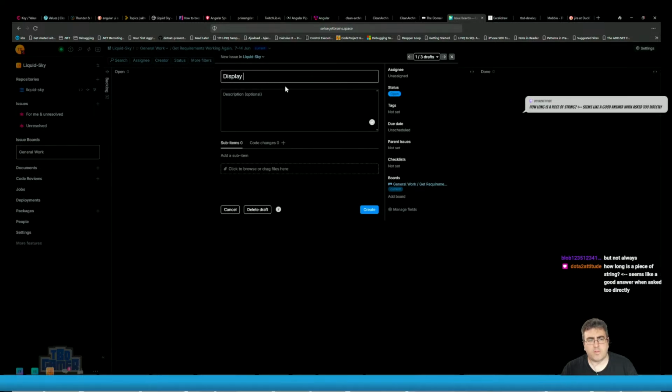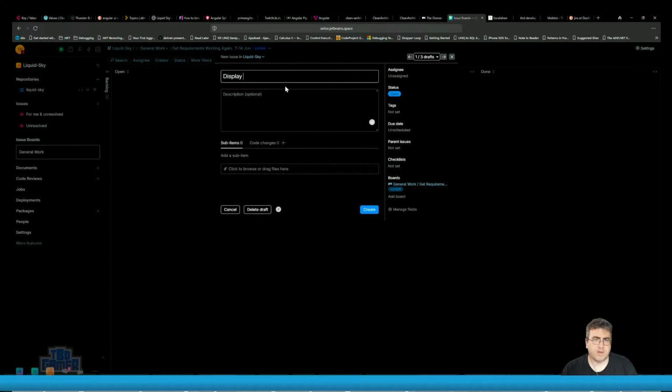Yeah. And it depends on what we define as a task, right? If it's, hey, can you go and add this button on this page to call this thing, and I understand all the requirements, how long do I need? Then maybe it is a simple thing, but I don't want to specify, oh, that'll take me 20 minutes, or oh, that'll take me an hour. Regardless, even if it seems simple, because it might not be simple. It might have data dependencies. It might have a navigational issue. It might be all sorts of things that I don't take into account at that point.